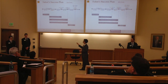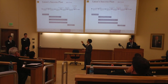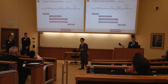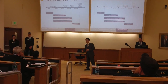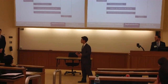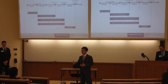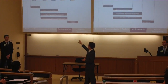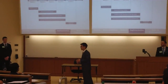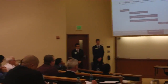So this process is going to take approximately 1 month. After the decision is made, you can start reviewing and redesigning the Kanban system, searching for a warehouse on the West Coast, and developing external suppliers and building relationships with consignment partners. Reviewing and redesigning the Kanban system can take 2 months, and hopefully by the end of the 5th month,